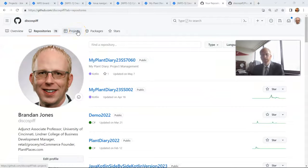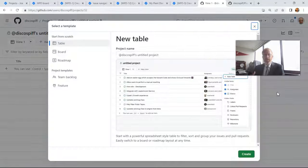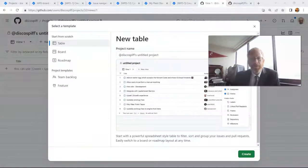To get started, let's go to our GitHub repository and choose Projects, then choose New Project. I tend to think about a project like an epic — a function or feature that a user will understand. We can add tasks to that project, so if you're thinking of something like JIRA, a project to me is an epic. We can not give dates to projects and just take one sprint at a time, or we can give dates to them. We can also associate them with milestones, where a milestone oftentimes would be a release.